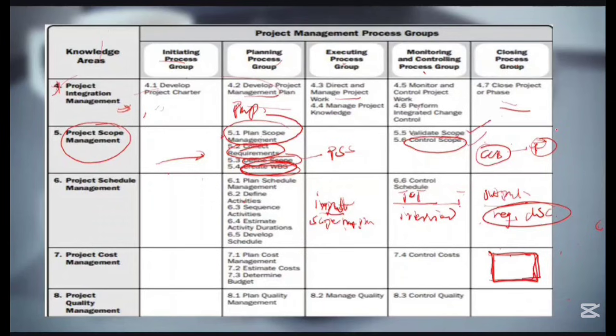Now, once it's been approved, it goes into the scope baseline. It was A, B, C, D that we had to do. Now F has been added to what we have to do. So we redefine and re-baseline the scope. But we are controlling, we are checking what comes in. We make sure whatever we are doing is what we are supposed to do. It's been approved. Nobody will do something that they are not supposed to do. And once you go through this, there's a term we use, scope creep. You avoid scope creep.